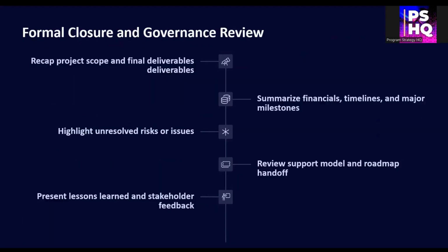The project closure meeting is your final governance checkpoint. Summarize the final scope, financials, timelines, and key accomplishments. Review any unresolved risks and discuss how they'll be managed post-project. Share the lessons learned, finalize your support roadmap, and formally close the project.